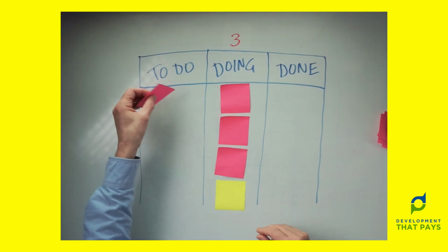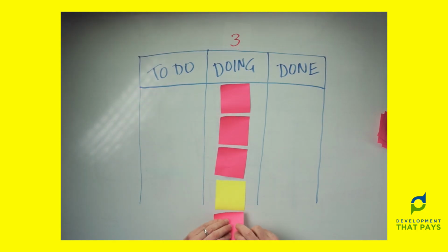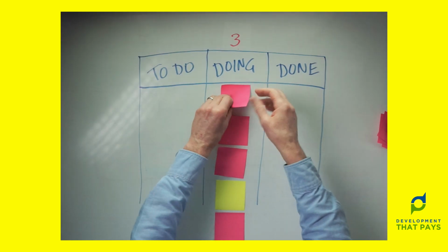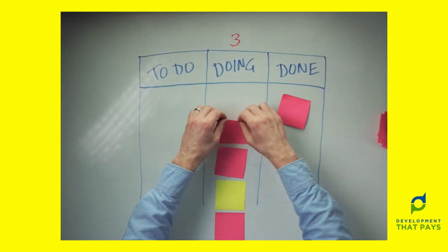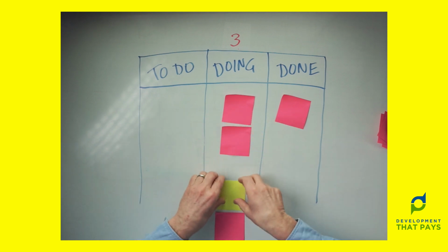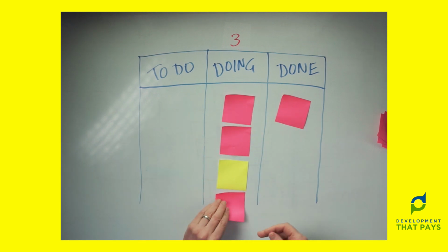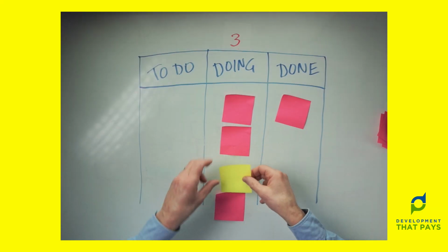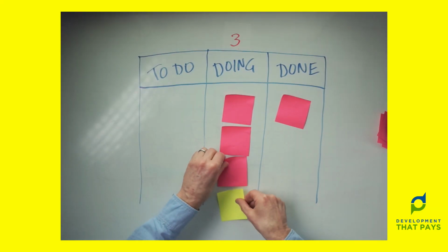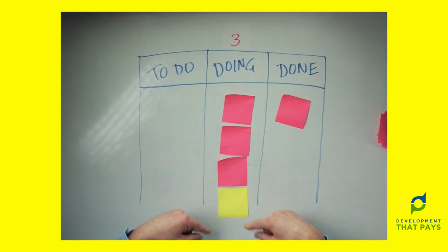The idea being that if another card is picked up, it ends up here and it's visually obvious that the WIP limit has been breached. Now, the problem, of course, is when this card is moved, then these all ripple up. And it's a manual operation then to reposition this one in the 4th position in this column.